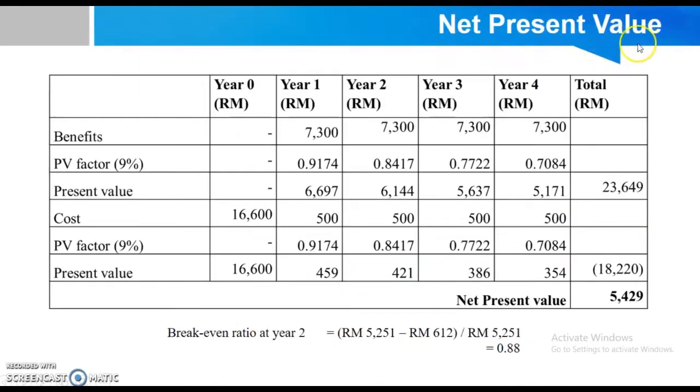For the net present value, benefit minus the cost, we get the net present value positive, which means that we can invest in the project. Then the project break even is 2.88 years.